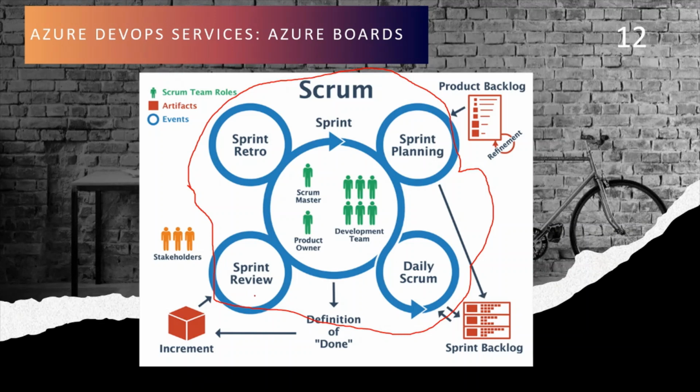And a sprint review is different. A sprint review is where you review with your product owners and stakeholders. You review your sprint product, what you got in that sprint. So basically you do the demo, and product owners and other stakeholders provide you feedback, and then you can include that in the next sprint or not, depending on your load.